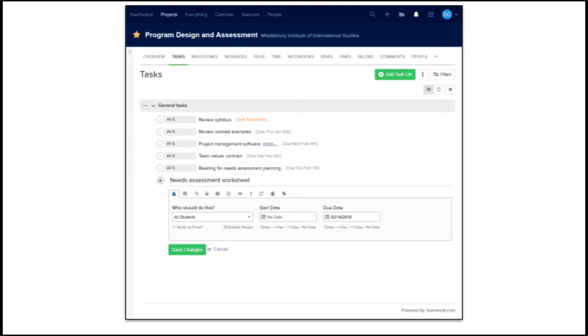So a task is something that is a component of completing a project, and it can be documented with a great deal of detail, or it can be a relatively short description of some kind of a task. Also, in these project management systems, tasks can have due dates, they can have start dates, they can be intended to last for specific durations. Like, I have 4 days to complete this task, but it doesn't matter when I start it or when I finish it, but I have no more than 4 days. So that's an example of a duration-based task.